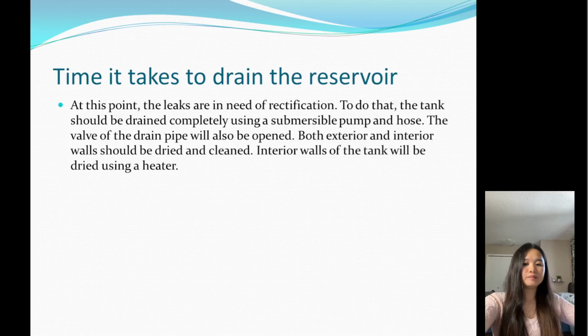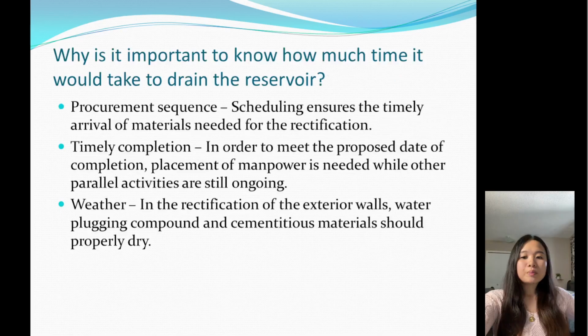Okay, so before I go to the next slide, before I show you the computation, I will be discussing to you first why it is important to know how much time it would take to drain the reservoir completely. So the first reason is procurement sequence. As I mentioned earlier, scheduling is very important in a project. It will ensure the timely arrival of materials needed for the rectification of the leak. In some parts of the Philippines, some materials are not readily available. So we need to order it ahead of time and wait for the delivery.